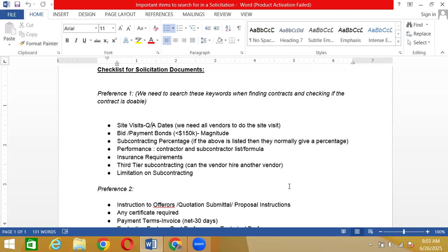It has to be replaced by a new one. So you see how that went? First, he said that it could be done at this cost. Then we got awarded the contract. And when we got awarded the contract, he refused to do it because it was unrepairable. Then we had to drop the contract. And that is a bad thing, because we made a commitment and then we backed off. That's why we make site visits mandatory.